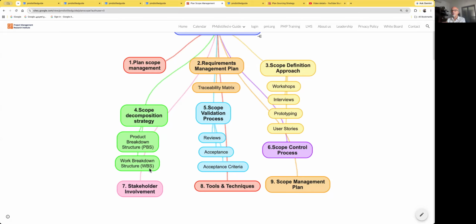Now, when it comes to work breakdown structure, if I have to develop that component one, I should do detailed design, design reviews, coding, testing, bug fixing, unit testing, integration testing, maybe system testing. All these things get superimposed on top of the product breakdown structure, and we arrive at the work breakdown structure. We'll be explaining these things in detail as we proceed.